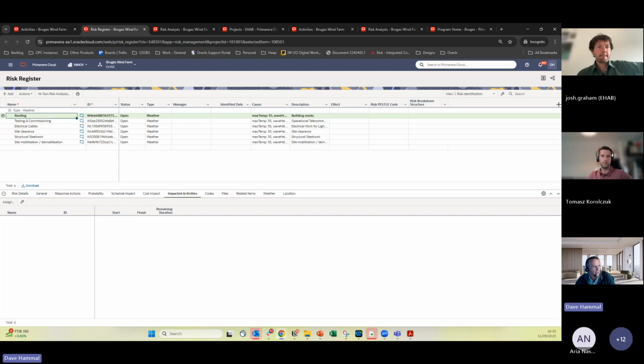I'm coming at it more from the angle of you wouldn't necessarily have to take your plan to EHAB to begin with. You could just say these are the different categories that are relevant. These are the 6 or 10 or whatever that I'm going to pick. Give the overall time frames of the project. Like it's going to start January next year and last for 3 years, but you wouldn't need to give the detail of the schedule. And then it would just generate the 6 risks over a 3-year period, and the mapping between risks and activities you could just do inside of here, or Safran or whatever. I'm sure it does a similar process to this as well, right?